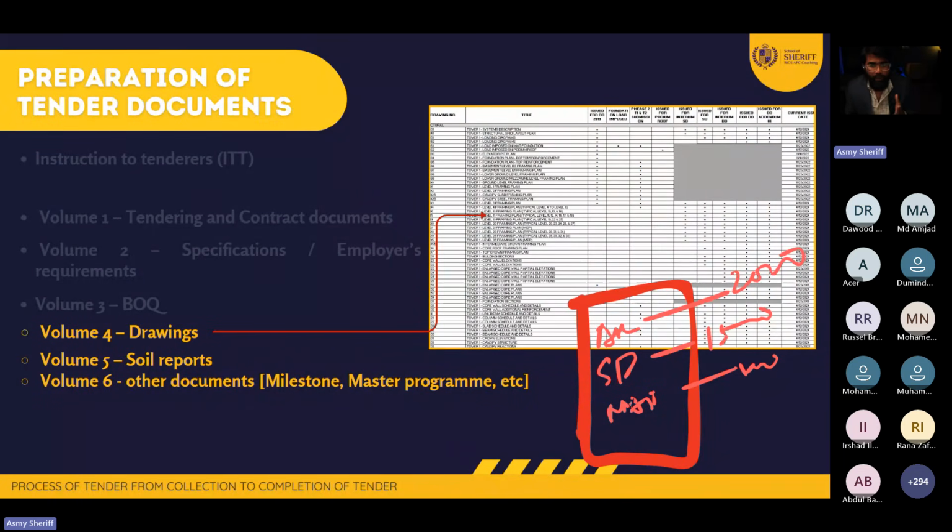So what are you going to do? You're going to collect all of them with a registry, with a log. You see here? So we have a log. All the drawings are listed with their names, and also when they were issued and what kind of information they included. Have they issued that for other parties? Have they issued it for other teams? So it's a log. Why they are using it, when they prepared it, how they came to the conclusion.